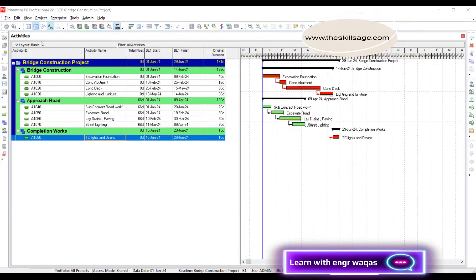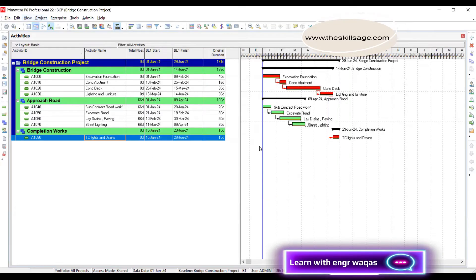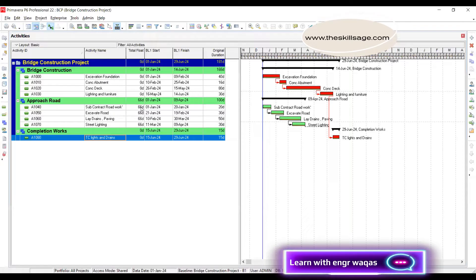I'll be sharing the XCR file — you take this file and update your project schedule following all these steps. The first thing you do is save and assign this as your baseline so that P6 automatically compares your project schedule. I'll also be sharing the contemporaneous records I've saved. Here is the first window, and you can also see there is a float of 66 days in the approach road.